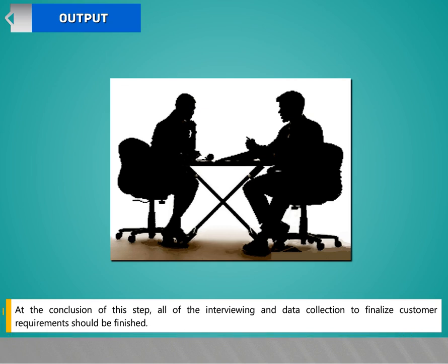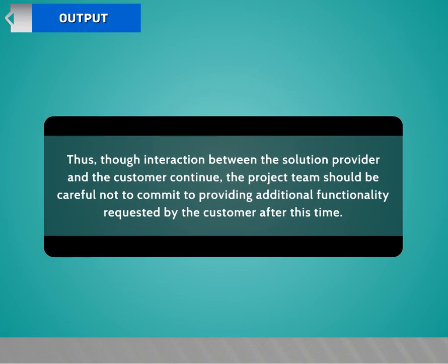At the conclusion of this step, all the interviewing and data collection to finalize customer requirements should be finished. Thus, though interaction between the solution provider and the customer continues, the project team should be careful not to commit to providing additional functionality requested by the customer after this time.